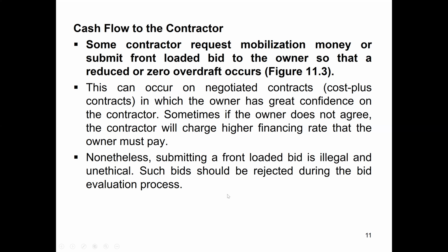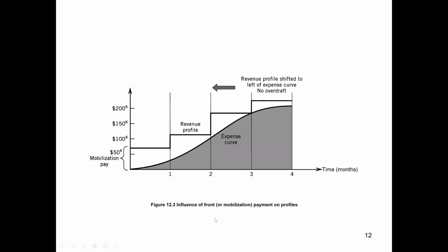Okay? So if a contractor is going to submit a front-loaded bid, this is ethically unethical and it is also illegal. And during the bid evaluation process, the owner or his consultant can reject these front-loaded bids. So see the figure of what they have.